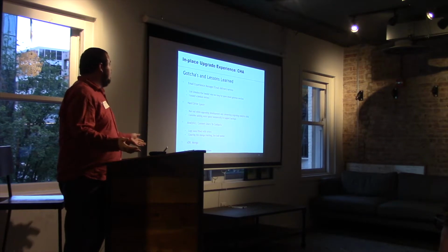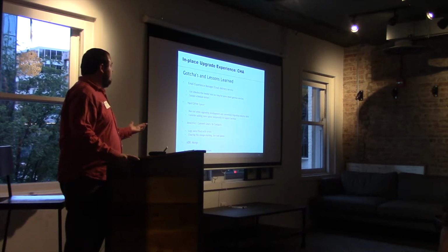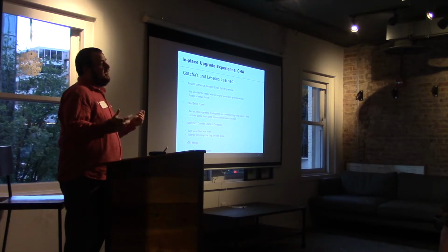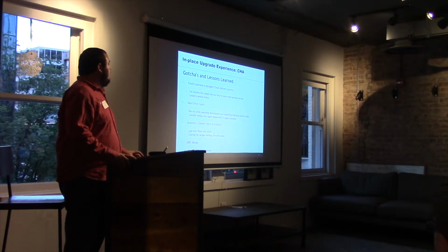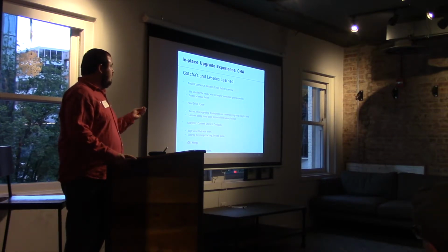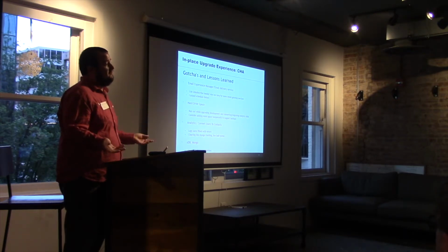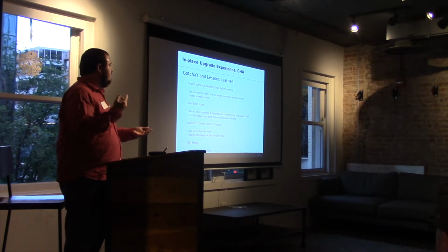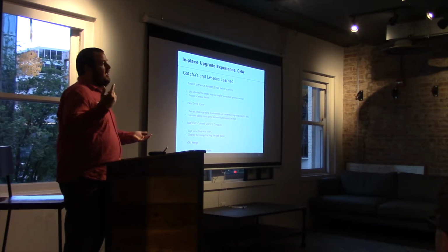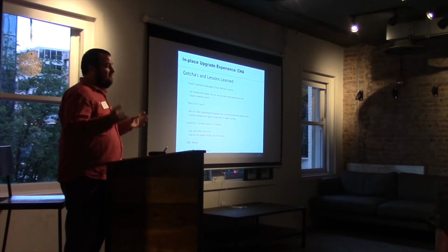Gotchas and lessons learned from this upgrade experience. The Email Experience Manager, email delivery service. This is what Natalie was mentioning before that caused the schedule delay. Essentially, the list unsubscribe header was too long for some email gateway services, specifically for CHA's email gateway service. And so we had to get Sitecore involved, we got SparkPost involved, and CHA's IT involved. And we all sat on a call and we troubleshot.